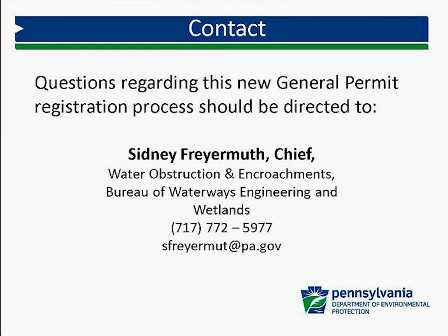Well, I don't know of any GP that can authorize a 100-foot wide pipeline corridor. I imagine a GP5 would not qualify. But to answer your question, I would report the maximum length and width of the wetland unless there's a big variance in the difference, and then try to point that out in your narrative to depict that on your aquatic resource impact table.